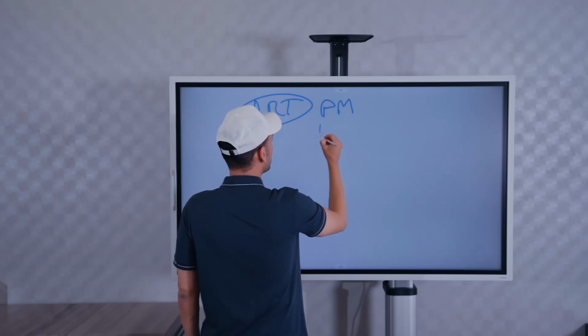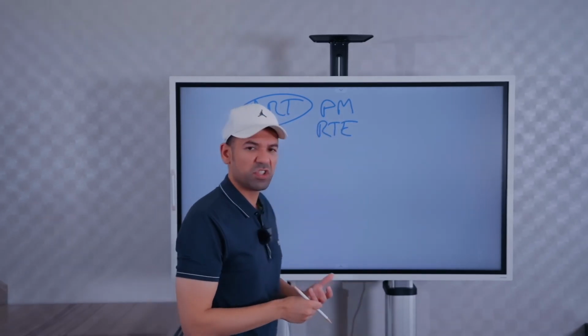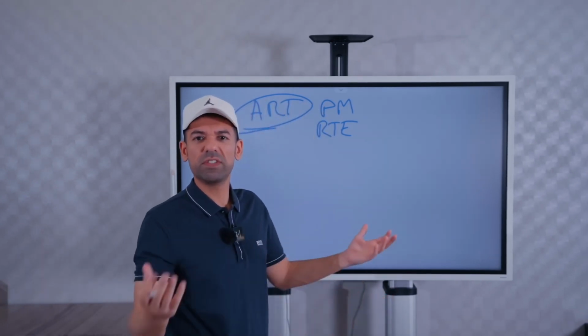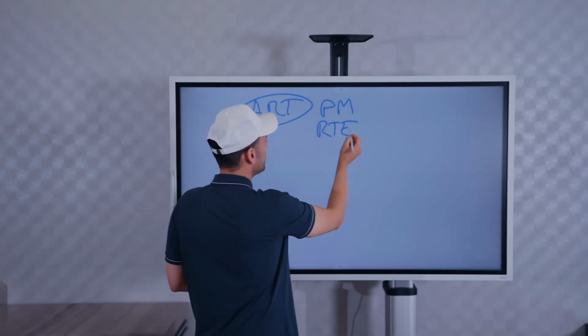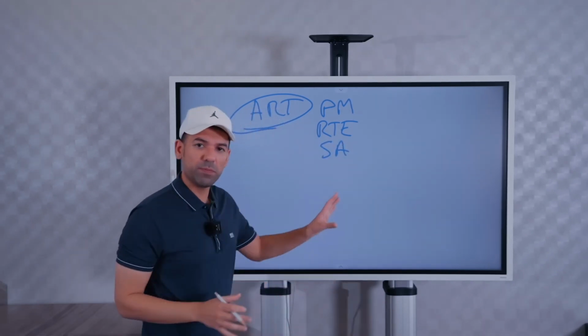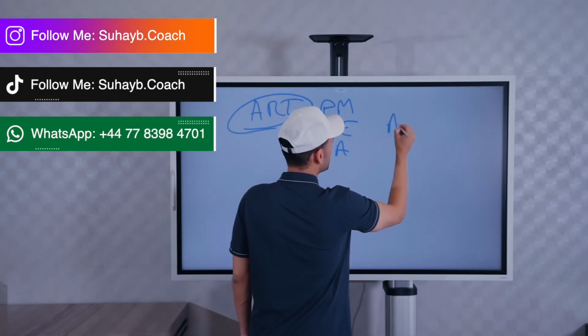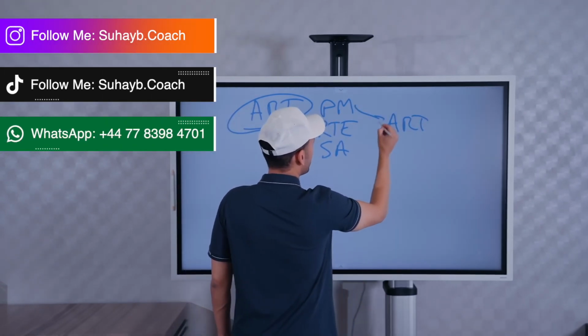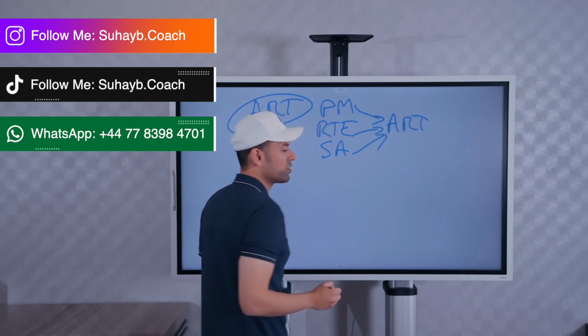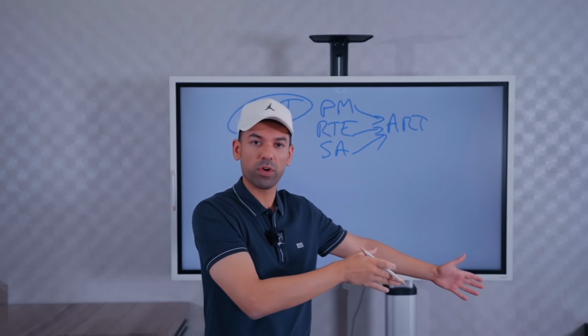You have someone that's called a RTE, or someone that's, you could say, the chief Scrum Master, the chief team coach, whatever you'd like to call it, and also a system architect. These people look after the Agile Release Train. So they're in charge of making sure that this thing is running smoothly and it runs on time, like a train. It should hit the station every point.